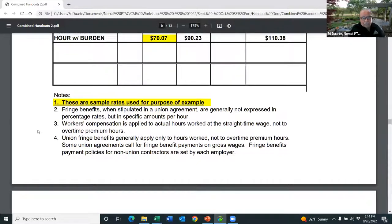So I'm showing those to you as an example of how quickly you can get out of whack and go in the hole on a project when you say, my five person crew will do this work in 4 weeks. And then you finish 2 days later, the dollar cost overrun, it's horrendous. So your estimates have to be accurate.